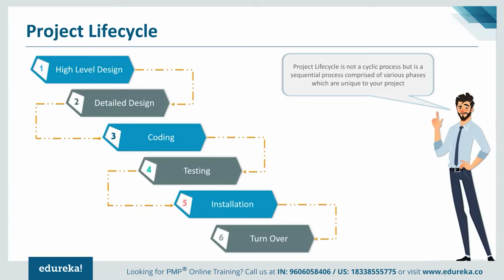So typically you would find whenever we begin working on any project, we always perform some initial project activities. So right from maybe identifying an opportunity for the project, from there it will start, a business case will be built. And once we have a business case approval, then your sponsor, who is the one who has some funds approved, can then allocate that fund to the team, to the project manager. And obviously, that's how the project journey starts.